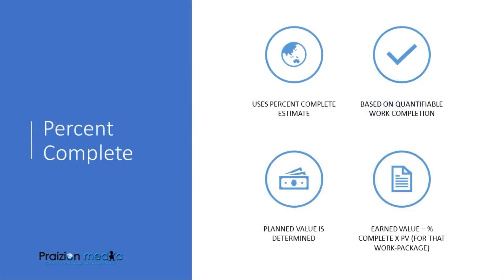The next one is percent complete, which we know well in the world of the PMI. The percent complete method shows an estimate of the percentage of work that is complete at the end of each measurement period. This has to be used with caution — you want an expert, and the project manager or whoever is doing this needs to be working with tasks that have truly been completed and measured to the best of their ability.